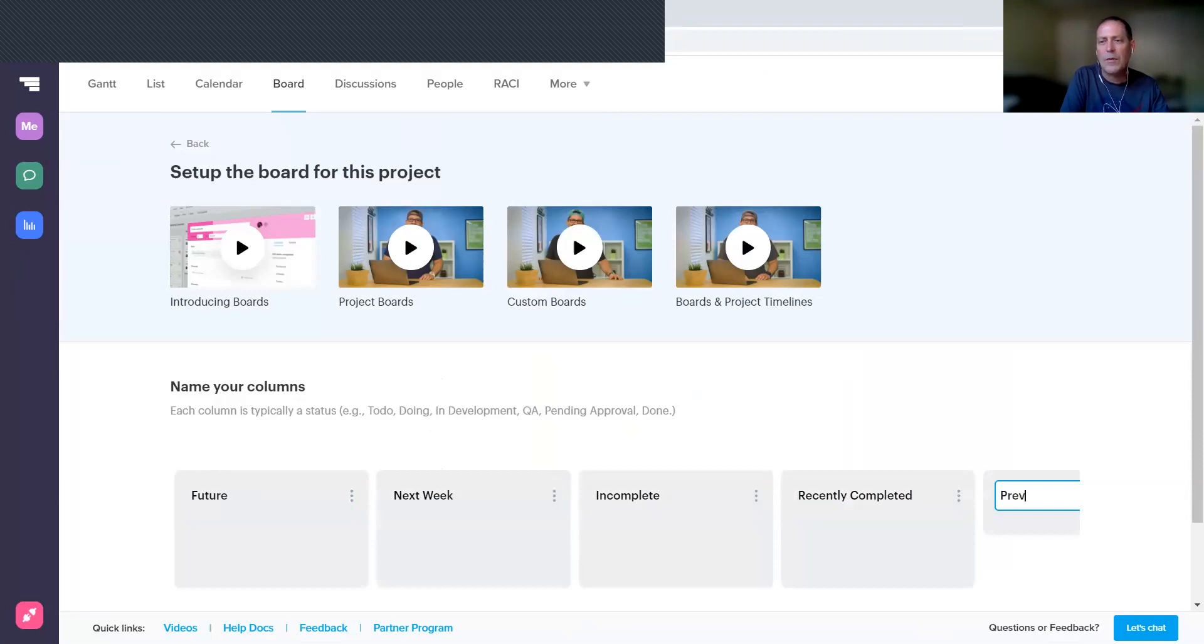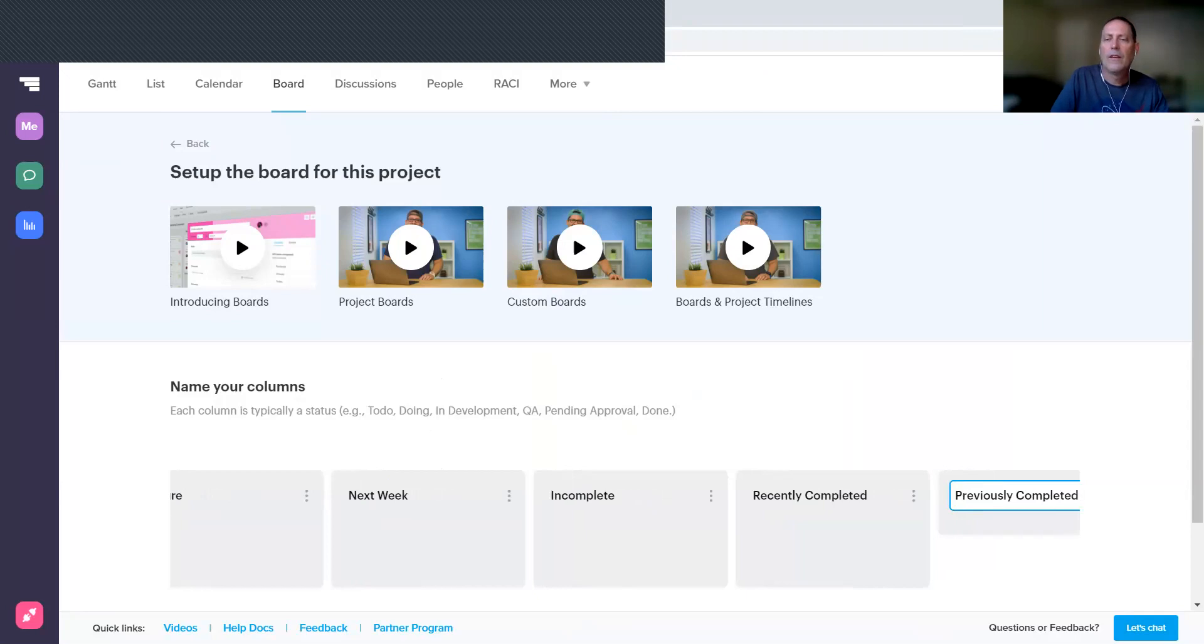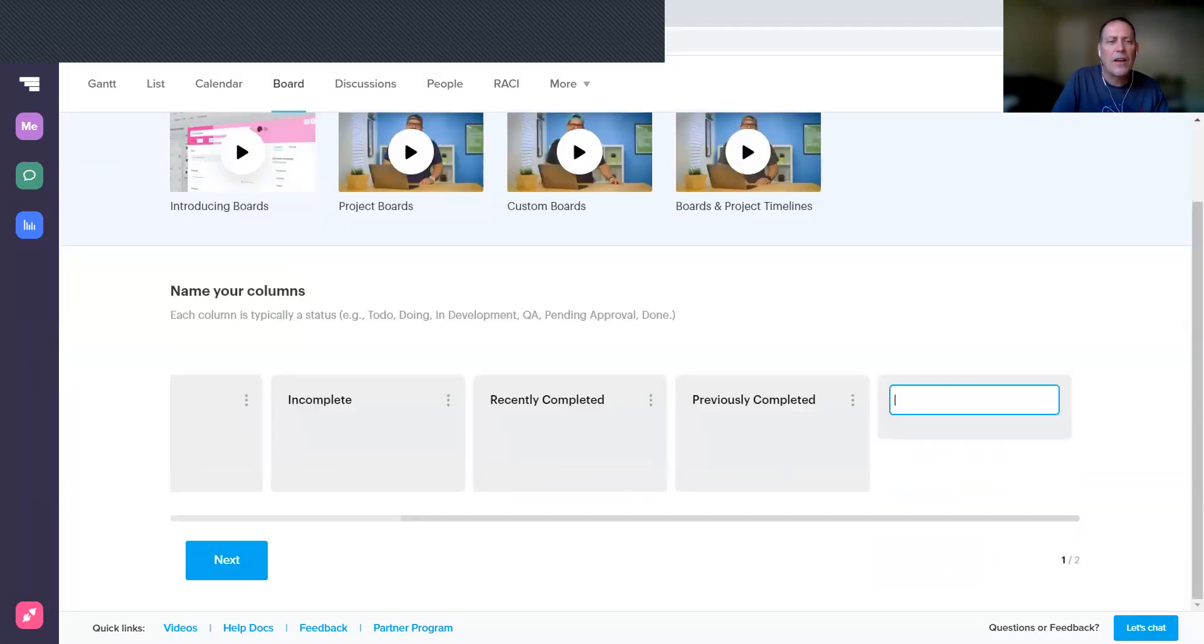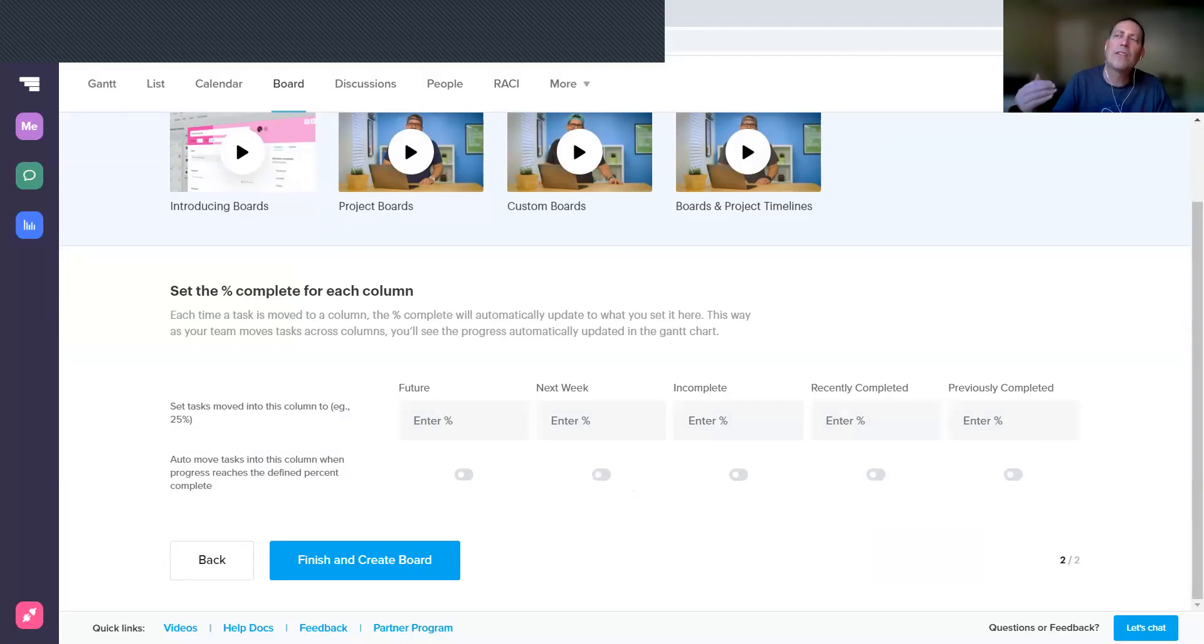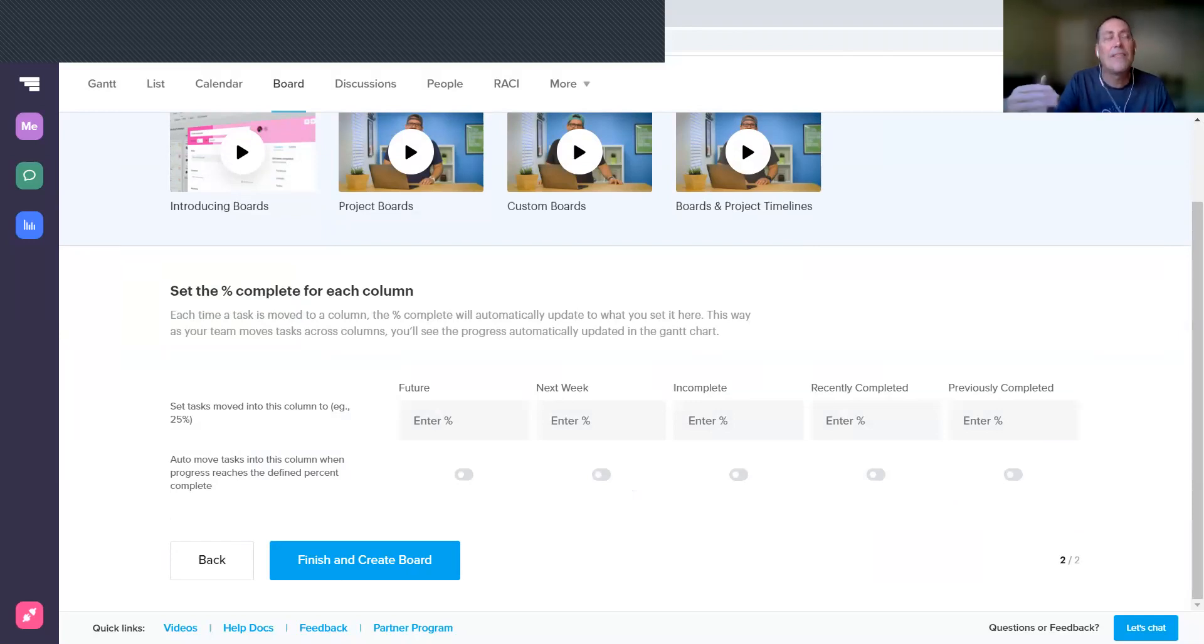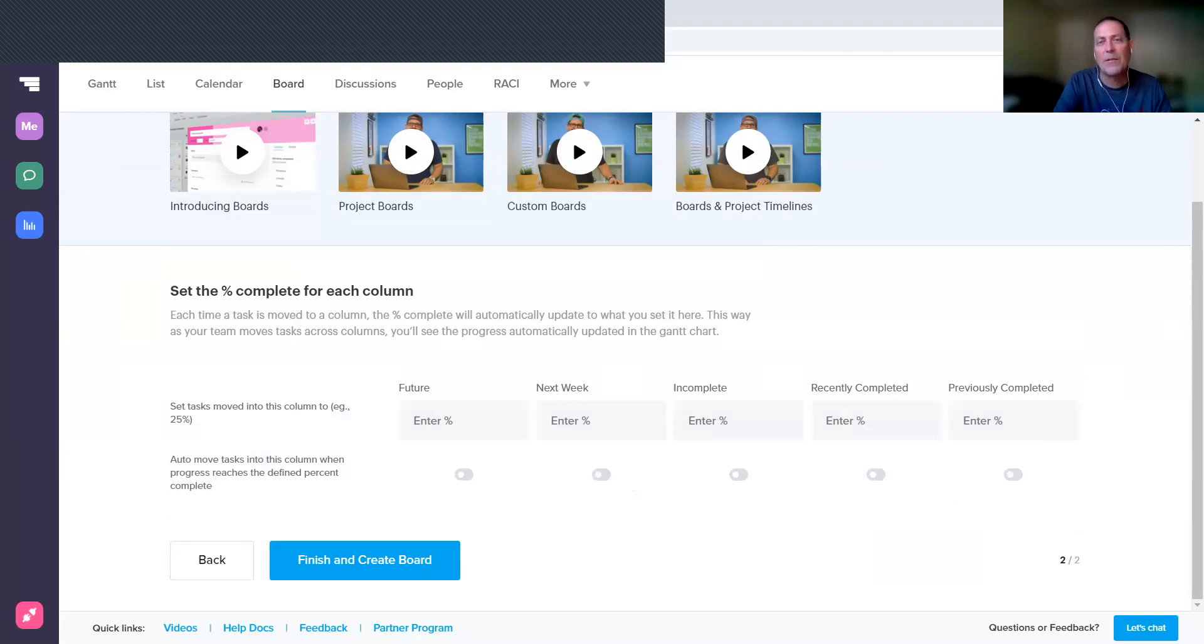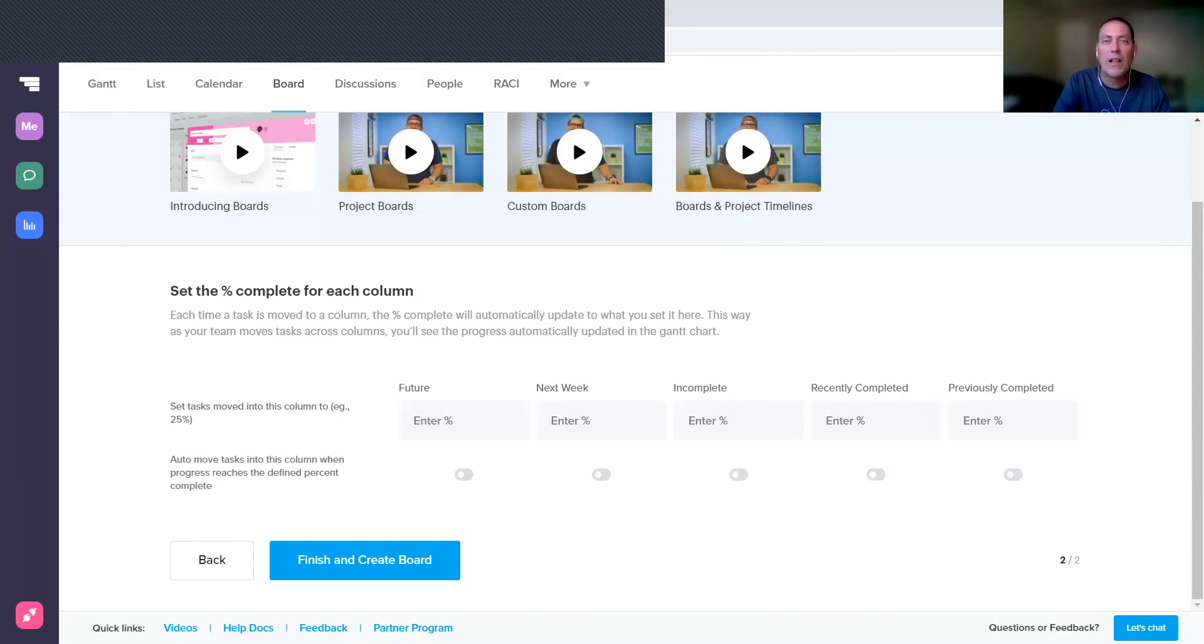And then Recently Completed are going to be those tasks that you completed in the past week, and then finally Previously Completed. Once you've got them listed here, scroll down, choose the Next button, and you can establish a percentage for each of these, which is the task percent that will be applied to that task if you move it into that column.